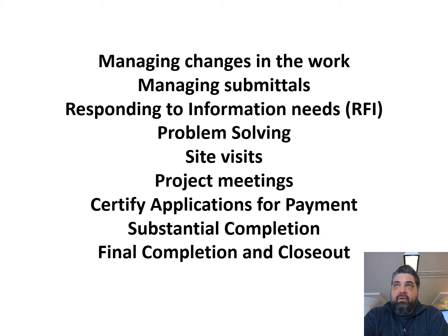So there will be times when a subcontractor is reviewing the documents, there's something that may be inconsistent, or they don't understand, or they don't know where to find it, or whatever. They'll submit that to the general contractor, and the contractor will submit that to you as a request for information. Once you receive that, you are asked to respond to that, and you send that back out. Sometimes you will respond to a request for information with a supplemental contract document that changes the contract documents in order to address the contractor's question or concern.